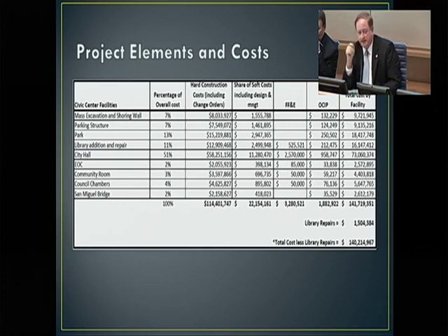In order to protect the public views, it was necessary to move 200,000 cubic yards of dirt at a cost we now know of $9.7 million. And while I think it's just great to believe that we could have required people to mandate that we have a buyer for it, there is a market for these things. And in 2010, when we were under construction, there was no market because there was nobody building anything hardly but us. So it had to go other places that we had to pay for, and that was the cost. And we were moving trucks out of here at about every 30 seconds, moving that dirt in quite a logistical approach.